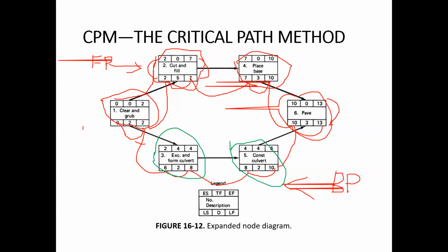There are two differences. So we input the lags, and then we also can represent the other types of activity relationships. So for example, here we have only taken the finish to start relationships. Okay. But some types of relationships can be the start to start relationship as well.